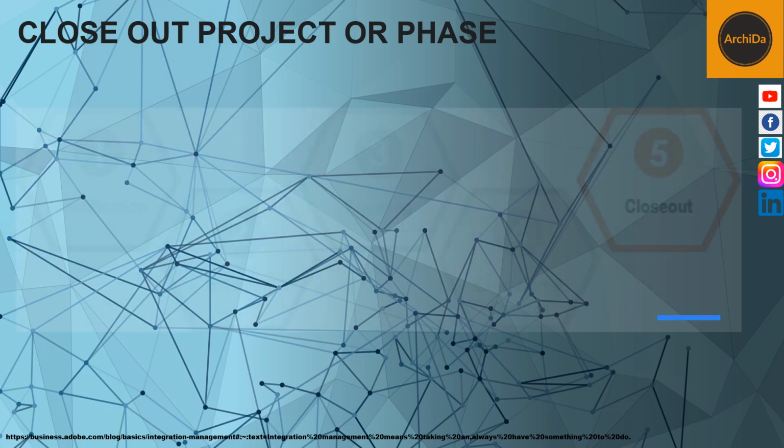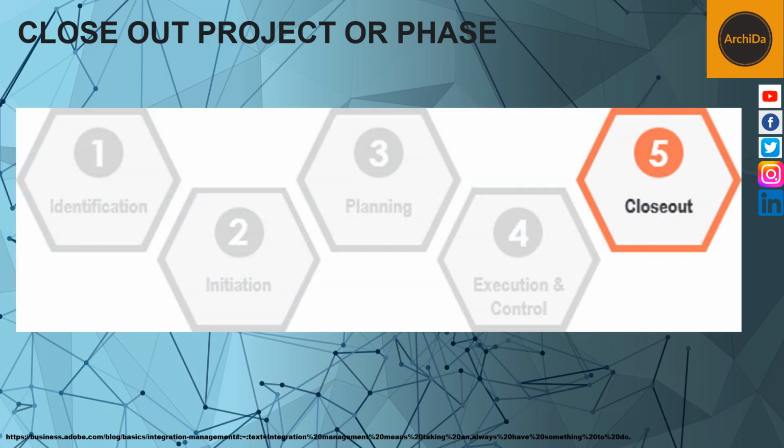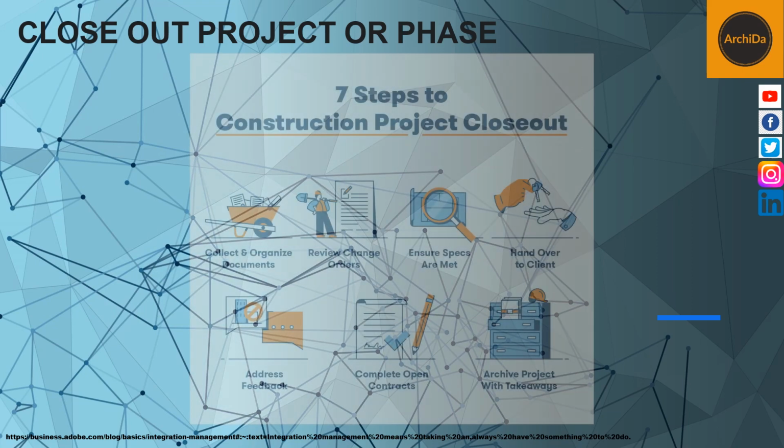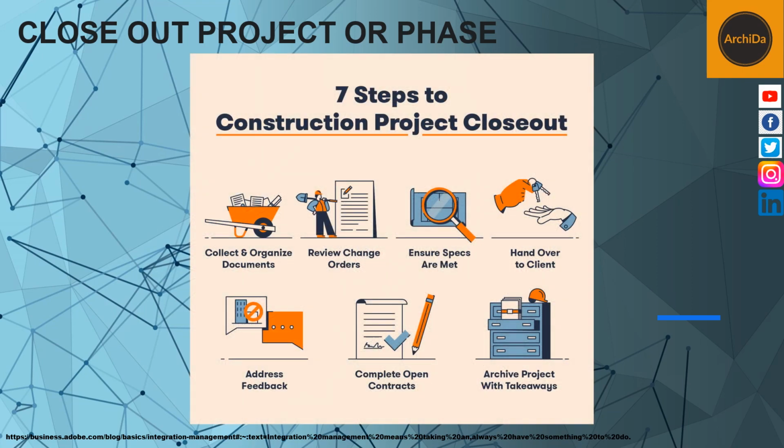The last is close project or the phase of closing. This is where successful projects wrap up. This step involves reviewing various aspects of the project and documenting findings to a reference archive. Some project teams find it useful for each member to rate the project execution and management in an official post-mortem review meeting.